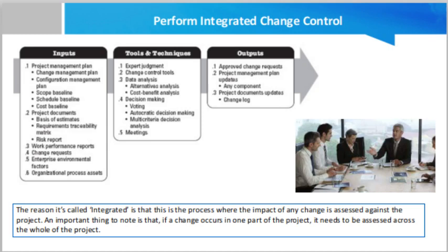It ensures that all changes proposed during the project are defined, reviewed, as well as approved before they are implemented into the project. Change control tools should support configuration activities like identifying configuration items, recording and reporting configuration item status, configuration item verification and audit, and other activities. Then the configuration activities include identifying changes, documenting changes, deciding on changes, tracking changes, etc.